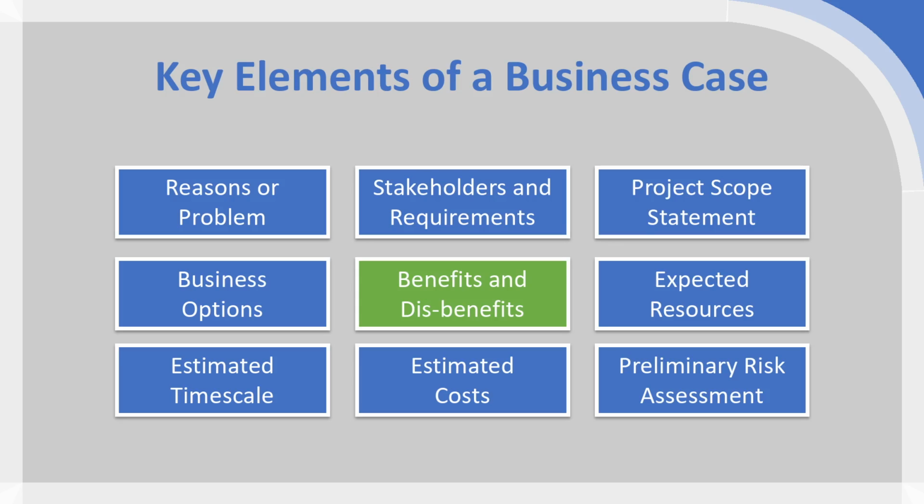So the benefit is not just having something done for the sake of it. It's identifying what's the benefit in having this done, what's the positive outcome or the positive change that's going to result as a consequence of doing these actions involved in the project. So if you're repainting the walls of a room, the benefit isn't having them repainted. The benefit is maybe it protects the walls, maybe it reduces the chance of damp, maybe it produces a brighter, more positive atmosphere within the classroom, maybe it encourages a learning environment because the room isn't visibly old or unmaintained. Those are the benefits of a successful project.